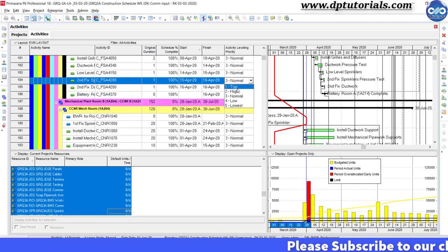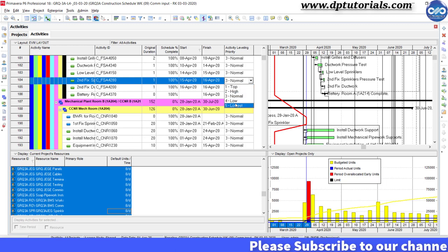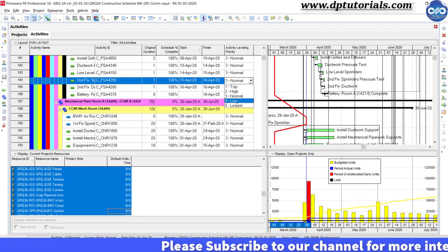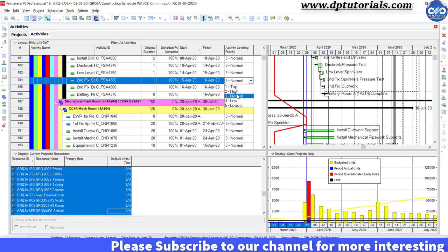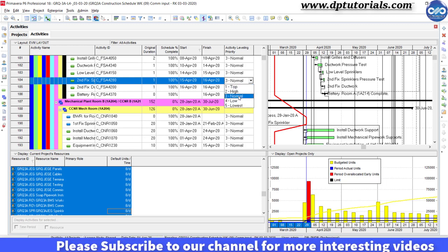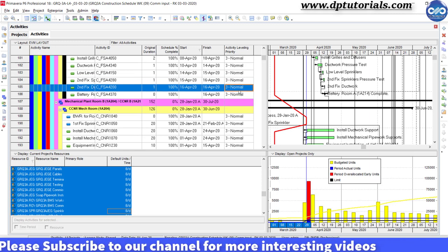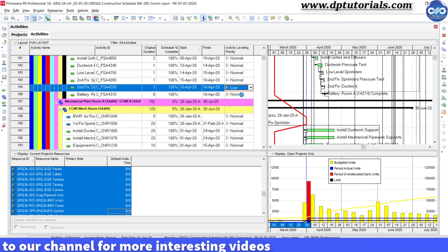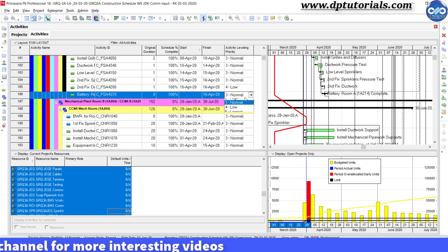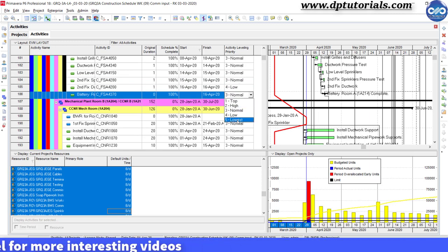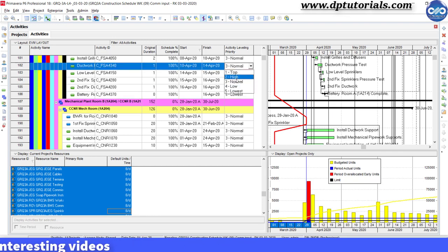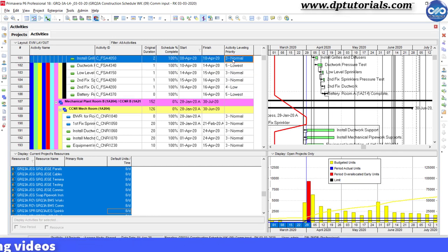The priorities range from top to lowest and can be set against activities within your schedule, which will guide the resource leveler whether to move activities or not.